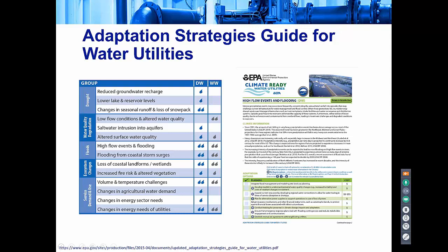It'll also help you look through different adaptation options and give you a very basic guide to the cost, whether it's going to be a bit more costly, like expanding current resources by developing regional water connections, or fairly low cost, like establishing mutual aid agreements with neighboring utilities, right? Establishing a mutual aid agreement doesn't really cost a whole lot other than maybe the time it takes to make those negotiations happen, but investing in more green infrastructure is going to cost more. So this tool is really great because it gives you regional climate change projections, so you know what's most likely going to threaten your region. And then it gives you some strategies and a checklist, which I'm always a fan of because it makes it easy. It means somebody else has thought through some of those issues. You can really just use that as a pretty good guide to your planning effort, at least on the front end.